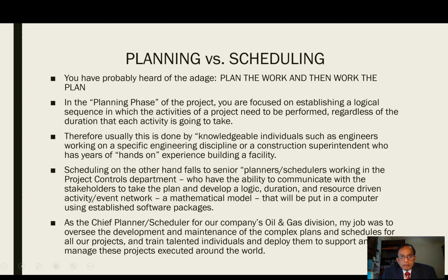You have probably heard of the adage, plan the work and then work the plan. In the planning phase of the project, you are focused on establishing a logical sequence in which the activities of a project need to be performed, regardless of the duration or the resources that the activities are going to take. Therefore, usually this task is done by knowledgeable individuals such as engineers working on a specific engineering discipline or a construction superintendent who has years of hands-on experience building a facility.